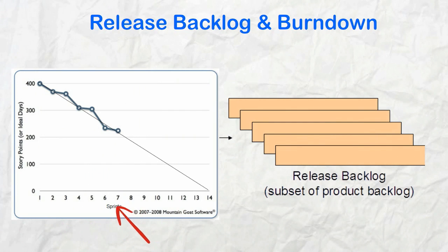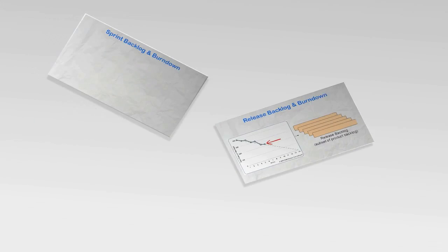Simply put, the burndown makes it easy to see if a project is on track, since a line or chart tracks progress, and if all is on track, the line will be on or very close to its diagonal guideline.